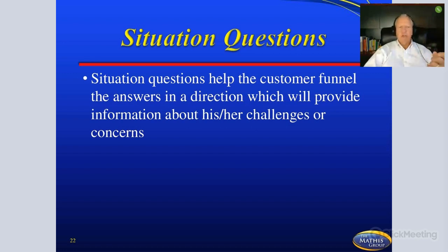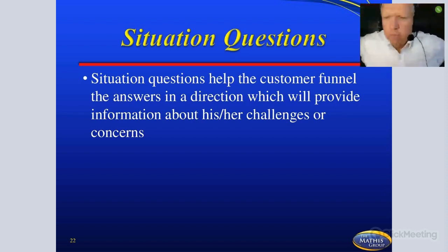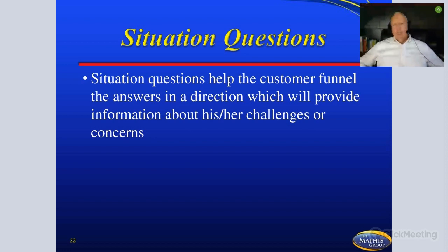Situation questions. Situation questions help the customer funnel the answer in a direction which will provide information about his or her challenges. Now, a lot of times we'll ask them about challenges, okay? The problem with that is sometimes the only challenge that we get happens to be the hot potato right now. And many of you have experienced this, and I know many of you have talked about this, but ask them about different situations. How would the customer interact with this? What would the customer do if this happens?